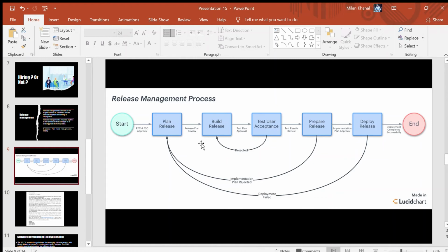Besides simply sending the build out into the production, the deployment stage also includes messaging and education on your product to both the end user and your company at large. Finally, during the deployment stage, the deployment teams should meet to assess the release performance and discuss how the deployment went. If there are any lingering issues, those should be identified and documented for the team to address in the next iteration. So there is always a second version. If something goes wrong, there is always a second version for it.